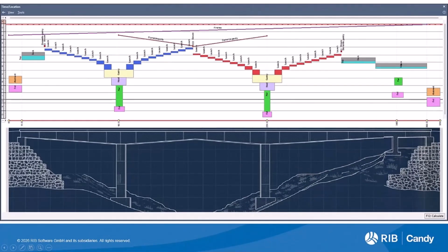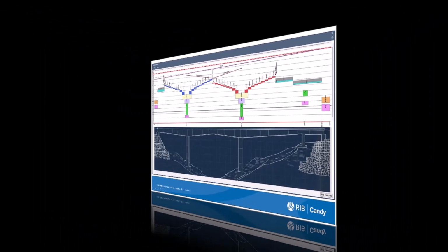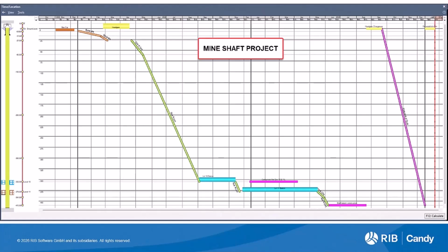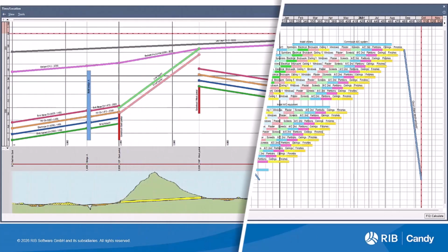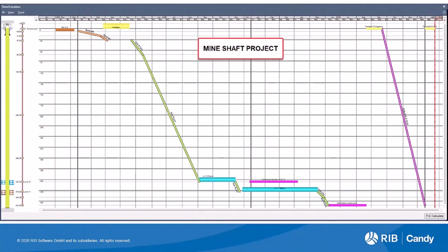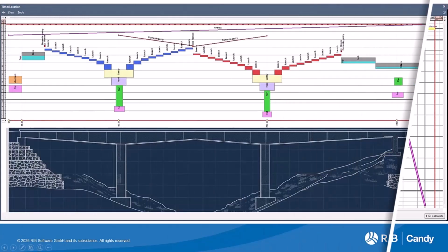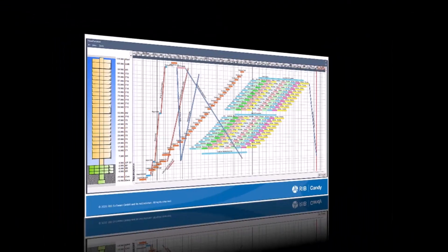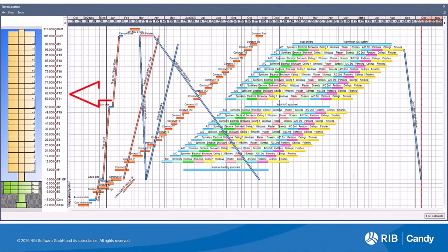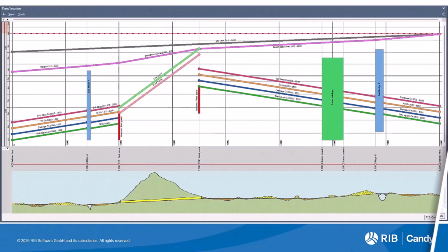Known by various names including line of balance, linear scheduling, location-based scheduling, time chainage, mass charts, etc. They are particularly suited to projects with linear or repetitive activities, such as high-rise buildings, roads, pipelines, railways, tunnels, mine shafts, etc. These charts typically display activities in relation to time and distance, or time and quantity. For example, a high-rise project may use floors on the vertical axis and time on the horizontal, while a railway project may plot distance horizontally against time vertically.